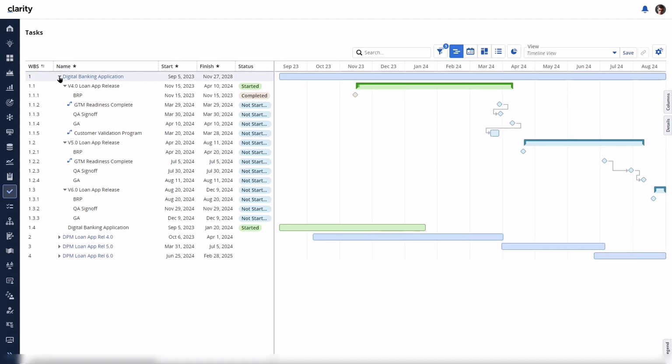Introduced in the last release, the user has the ability to draw dependency lines between any two tasks from different investments when both tasks are visible on the page. Now, the right-click action to add an external dependency is available here in this Cross-Investment Task workspace, and the same can be done in the Hierarchies Task module.